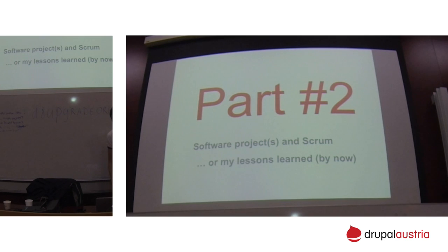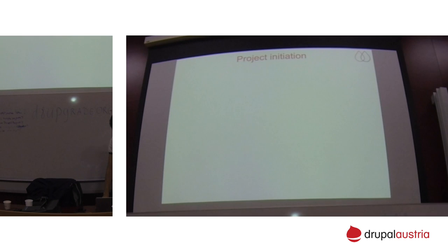All right. So now I'm going to talk about some lessons learned, some practical things that are not something that is happening in my ideal world. So, how does the project work? At the beginning we receive some initial client requirements, which are very high level. Then we do the discovery. The discovery might vary, but at the end the idea is to be able to say how much it is going to cost. And basically, on this decision, the client can judge if he or she is capable of funding the project. So let's assume that the answer is yes.